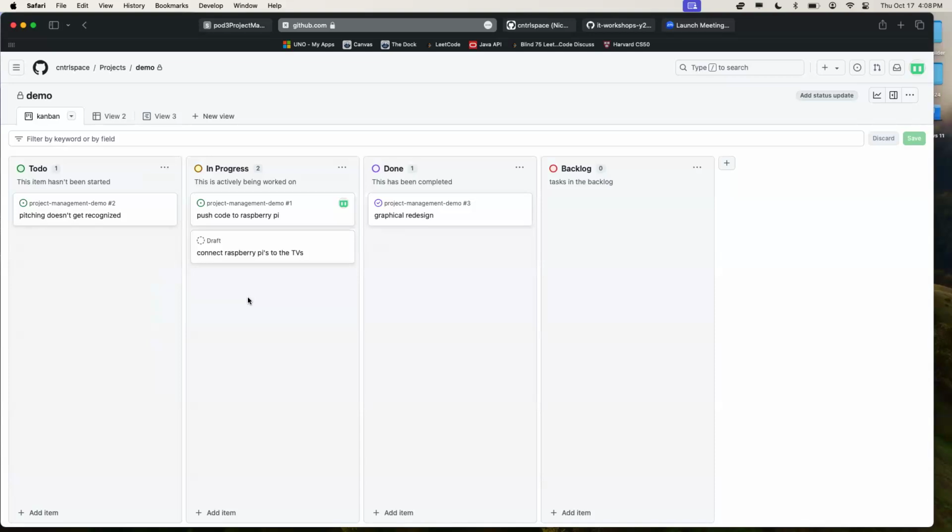If we're done with that milestone and we're moving on to milestone 2, usually what teams will do is move milestone 1 somewhere else because they're already done with the tasks, but they'll leave it there as a history of what they've done. So as Nicole said, it's as powerful as you want it to be, given how creative you get with it. That's a common practice people do: they set different weeks or milestones for the tasks.